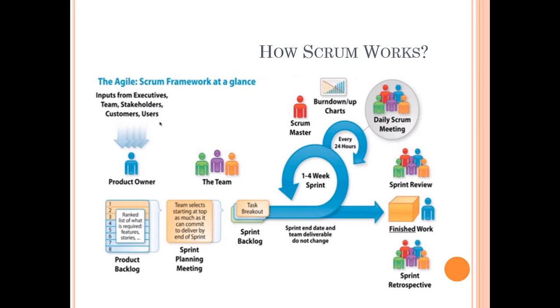The team knows how much they can consume, right? It is very well known, and it is the most important job of the Scrum Master to keep track of the team status, like how many team members are available for the next 2 weeks, what is our velocity, the rate of work we complete within a given sprint, then the efficiency of the team members, the technology understanding, or any other blocker issues or hardware and software related concerns. And keeping in mind all that, the team decides to select, say, the first 4 requirements.